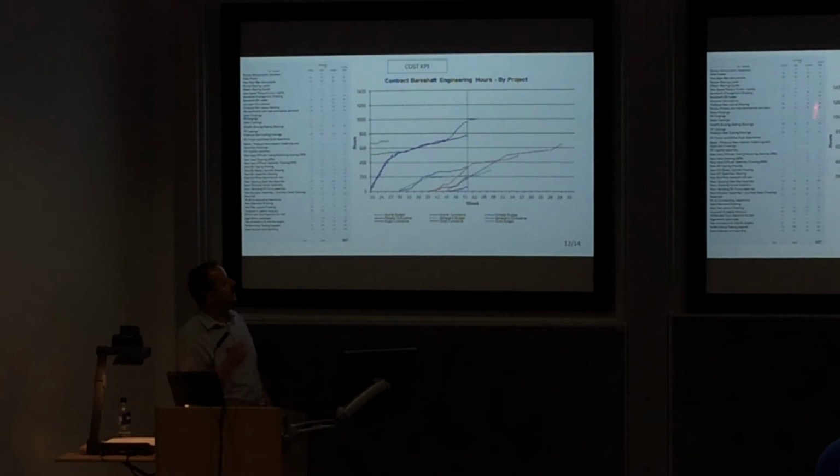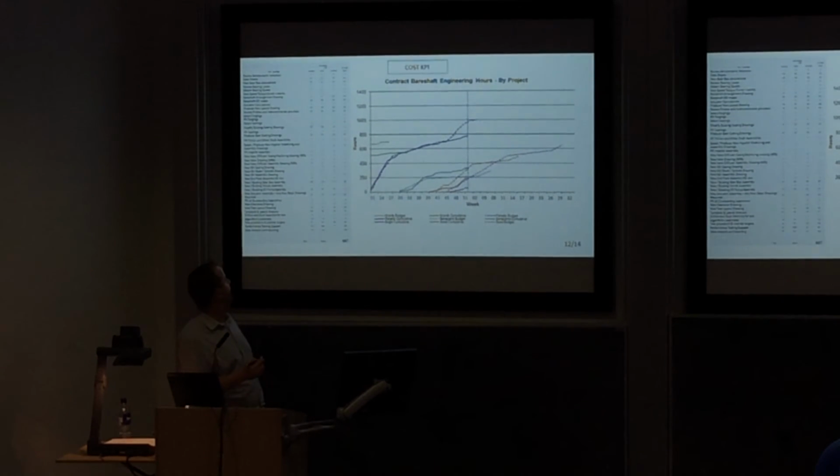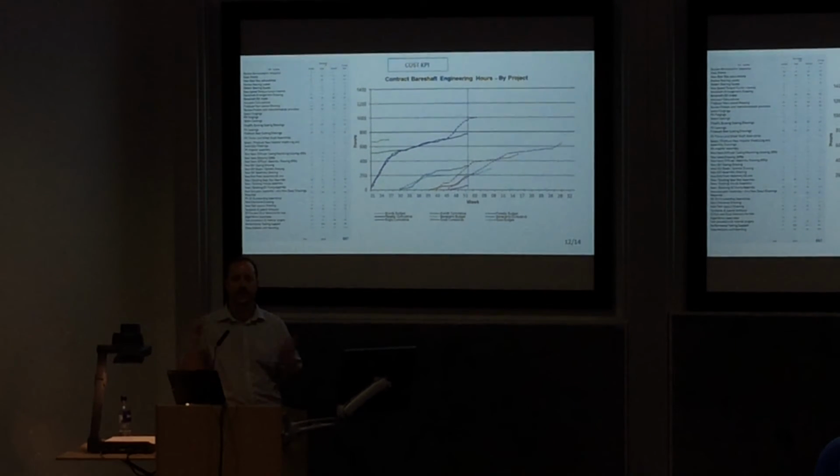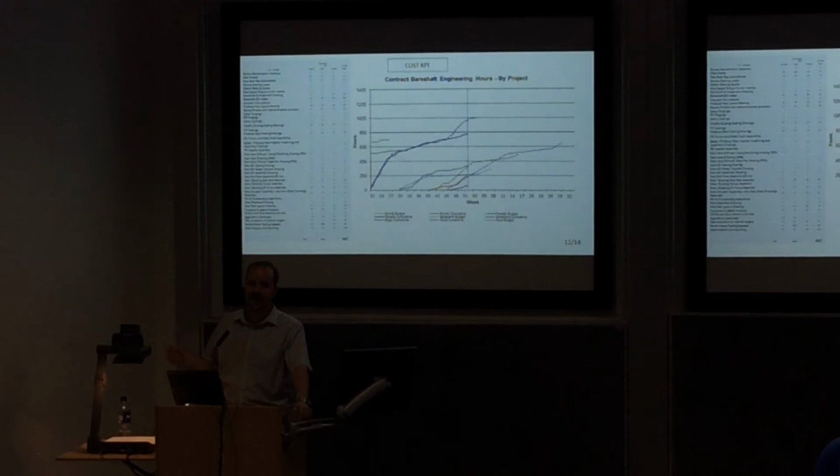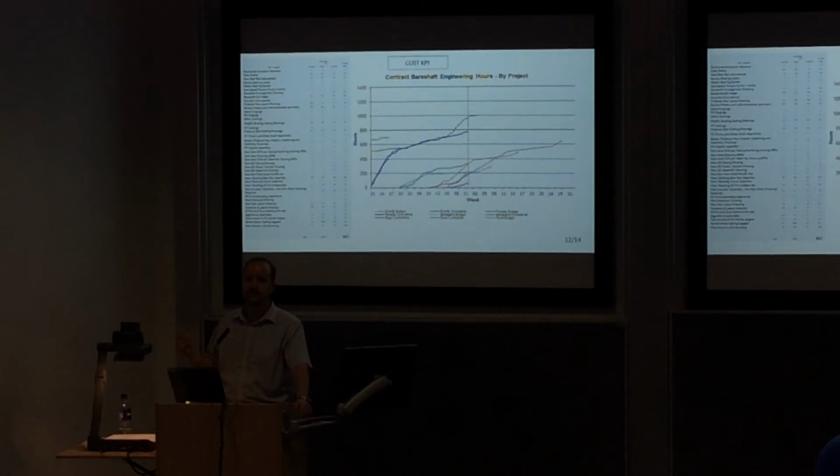of components in the assembly, which is very similar to what Dr. Green was showing you a wee while ago. And then the other column is the amount of time it takes to produce these drawings. If you are selling a batch of 20 components in the one run, then you would only produce the drawings once, which makes it more efficient because we're not constantly repeating engineering drawings and reissuing instructions.